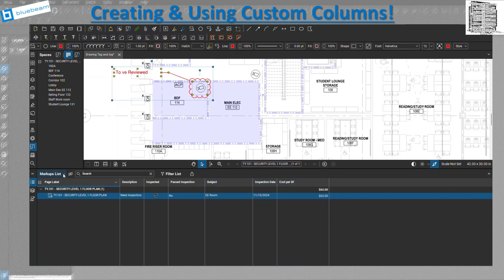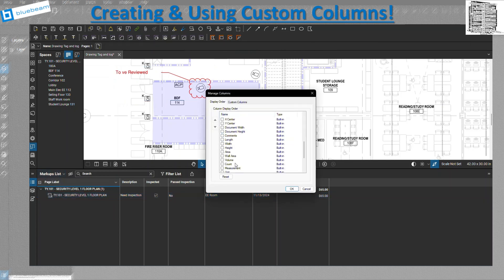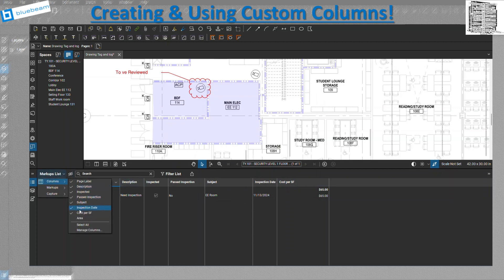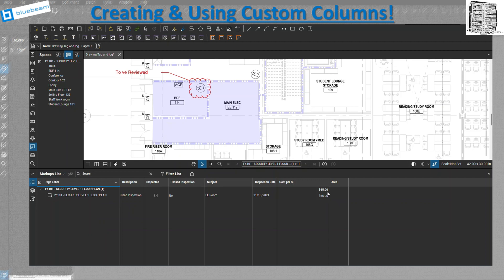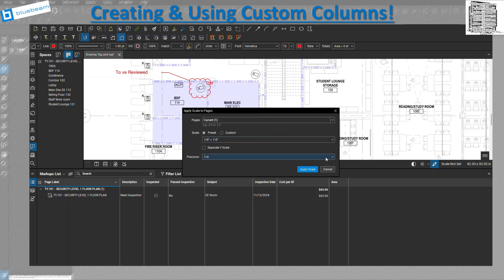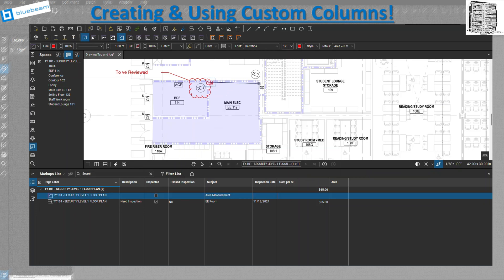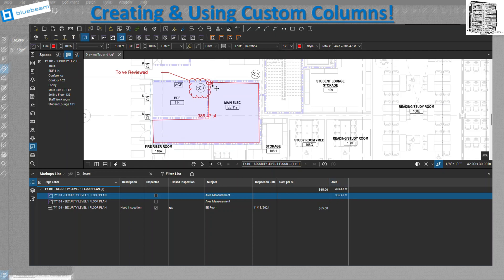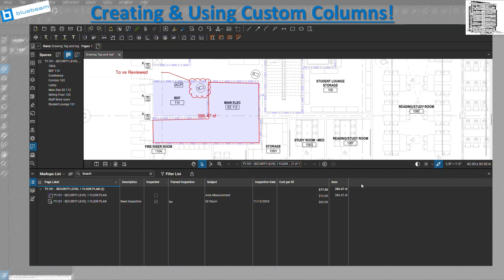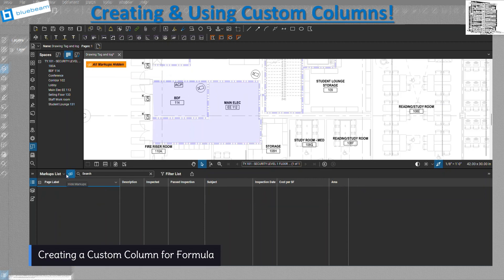With the Area column visible, I now need to actually draw a measurement. I'll go to the Area measurement tool, set the scale to 1/8 inch, apply it, and trace the room — then double-click to close. That gives me the square footage for that room. I then enter a cost per square foot — say $12 — but nothing calculates yet because I haven't created a Formula column to multiply them together.